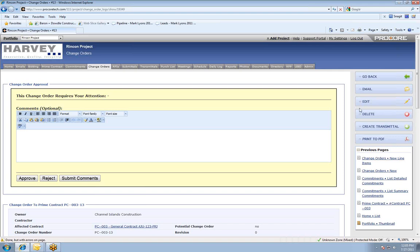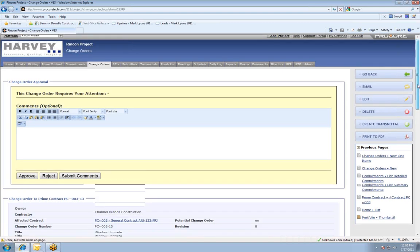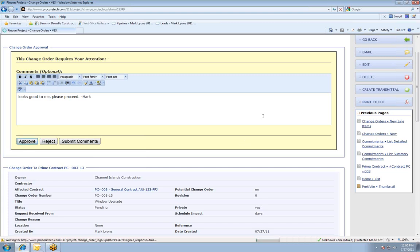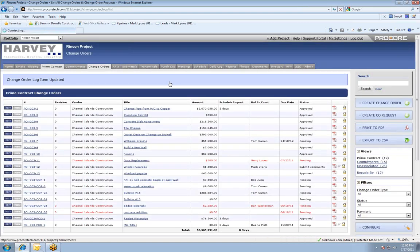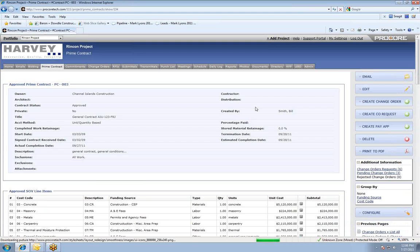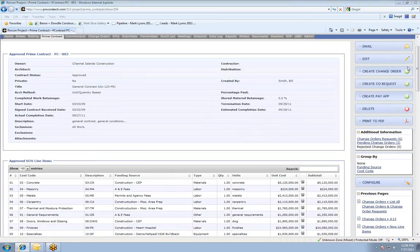I'm going to go ahead and send the change order out — this starts the communication process to all of the other people on the job. I was set up as an approver, so the screen I'm looking at now is what someone set up as an approver would see. When they receive the email and click on a link, it takes them into a screen that looks exactly like this, where you can actually require them to log on to Procore to provide comments and approve or reject the change order. Similarly to the RFI, if you have a specific template for change orders, Procore can have the system match that.